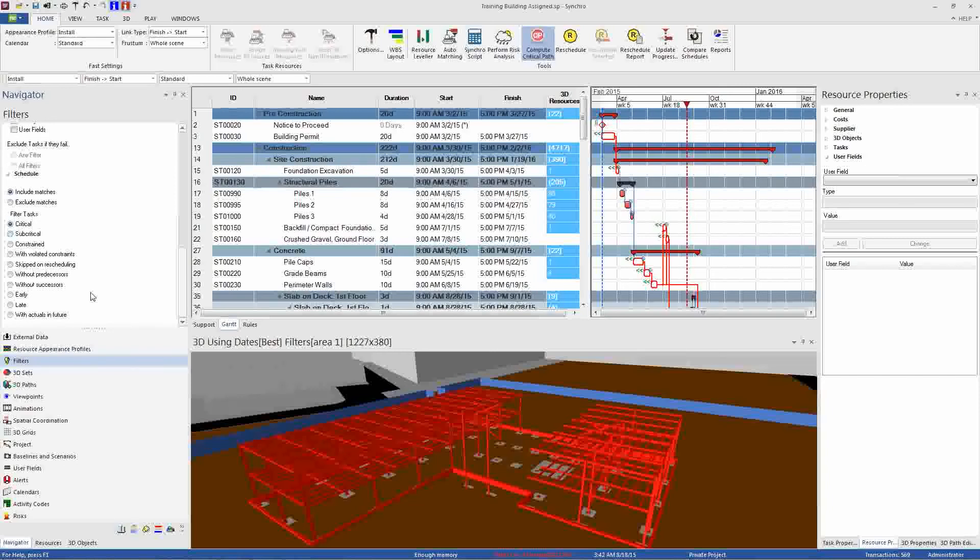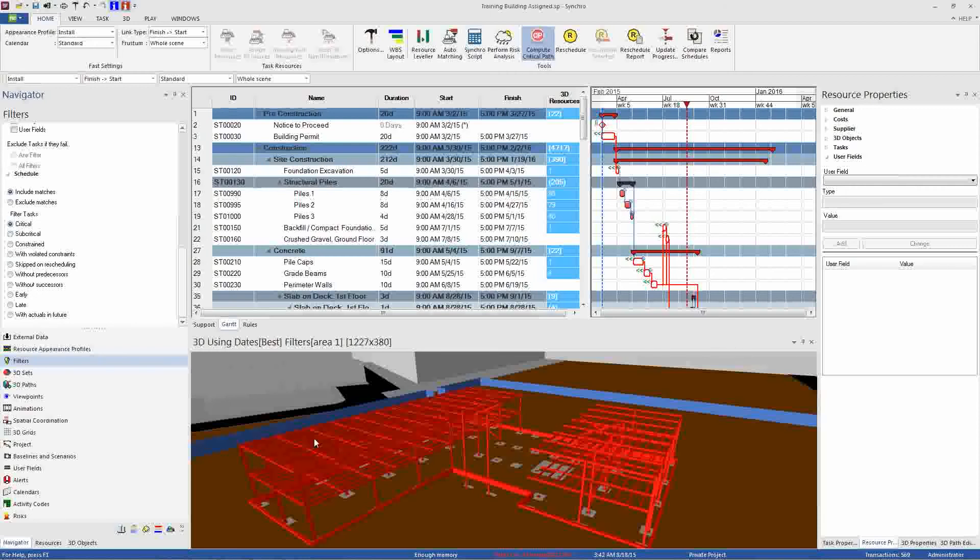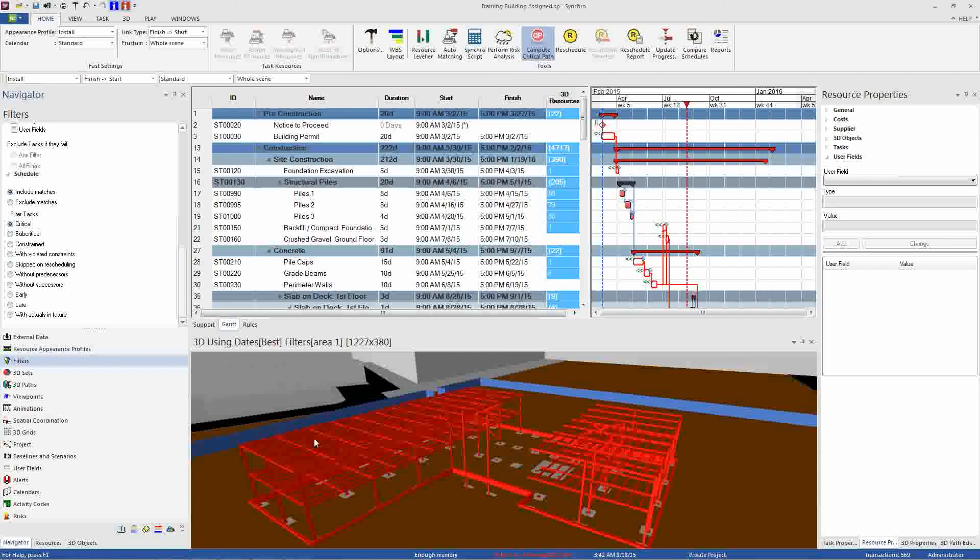Okay. And I think the final question, how do filters impact exports? So when you're exporting a video, your filters are enabled. So if you can't see it in your 3D window, you won't be able to see it in your video. If you're exporting an XML file, a schedule to Microsoft Project, there is an option to enable to use the task filter. Not necessary. You can have a task filter on in Synchro and choose not to use that when you're exporting your Microsoft Project XML. But when you're exporting to Primavera, the task filters are not considered. Nothing will be filtered. The whole schedule will go. So I'm not sure where you're looking to export, but sometimes the filters are considered and sometimes they're not, depending on where it's going.